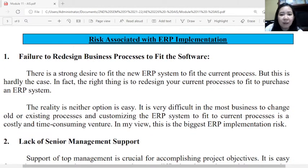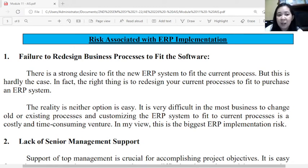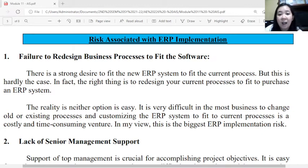There are nine possible risks associated with ERP implementation. The first is failure to redesign business processes to fit the software. There is a strong desire to fit the new ERP system to current processes, but the right approach is to redesign current processes to fit the purchased ERP system. The reality is neither option is easy — it is costly and very time-consuming, making this the biggest ERP implementation risk.